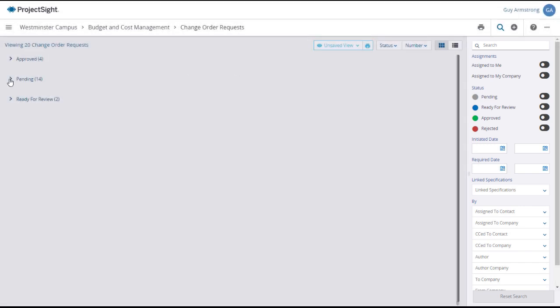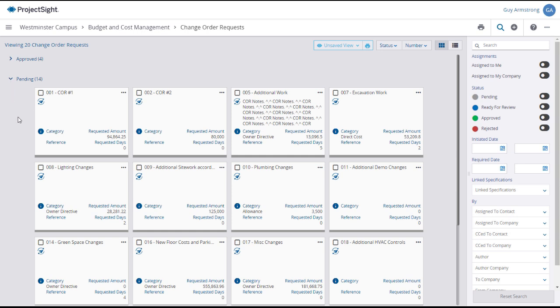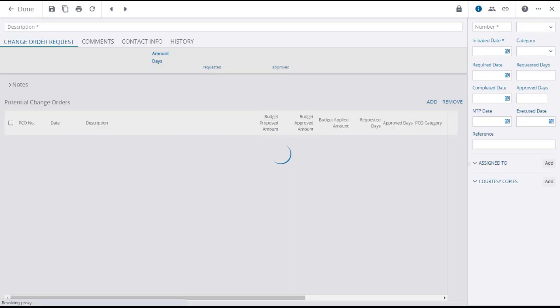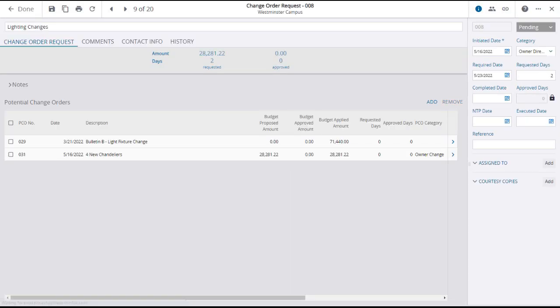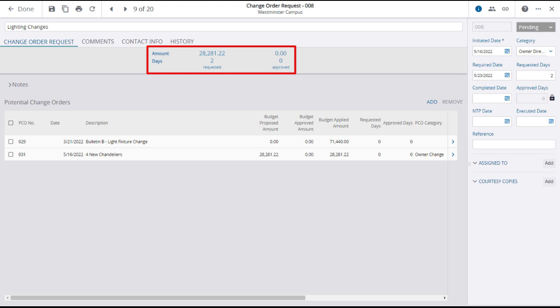To open a change order request, click on its tile. Clicking on a change order request tile will open its detail page, where you can see a summary of time and money in the upper panel.